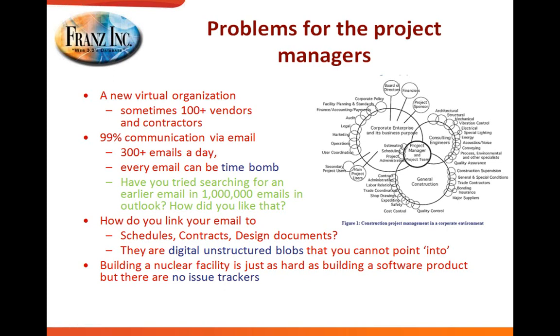And their problem is that every email can be a time bomb. Say you get an email that says, hey, the door will be 2 days late. That's not a problem, is it? Well, you can't say yes. The lawyers teach you not to say yes in this case. But you have to go to your design documents or your schedule to figure out whether the door is indeed too late, and, very importantly, whether or not you should send out a notice to the other party that they're in trouble.